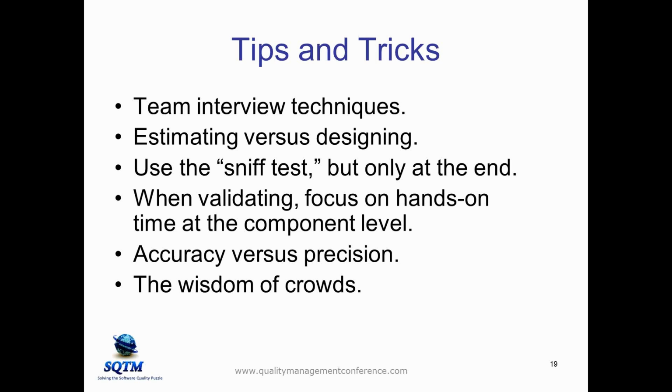When you're validating, if you are going to validate with some of the hands-on folks, I find that it's better to validate time at the component level and with the people that are going to do the hands-on for that component. So let's say the estimating model is coming out and saying this particular component is going to take 500 person hours of developer effort. Taking that to a developer and asking, does this make sense, is often a good idea for some of the higher risk elements. But trying to have them look at the whole project makes less sense.